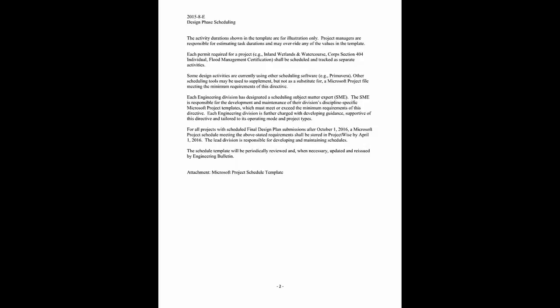For all projects with scheduled final design plan submissions after October 1st, 2016, a Microsoft Project schedule meeting the above stated requirements shall be stored in ProjectWise by April 1st, 2016. The lead division is responsible for developing and maintaining these schedules. The schedule template will be periodically reviewed and, when necessary, updated and reissued by Engineering Bulletin.